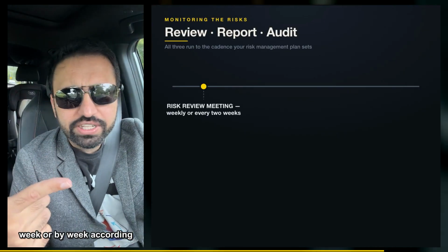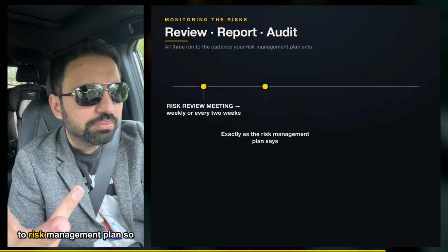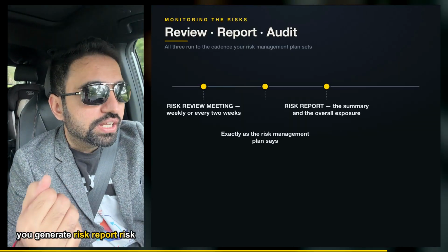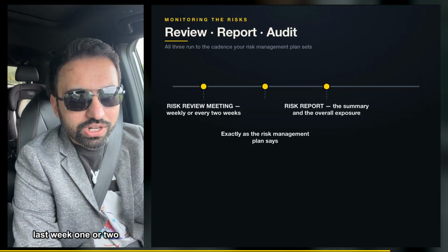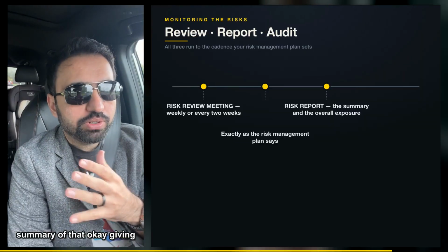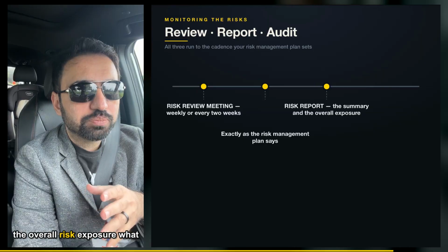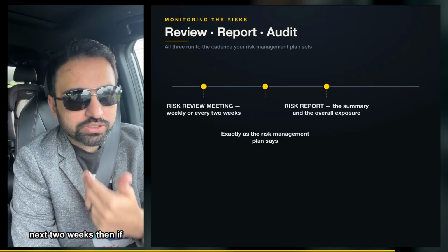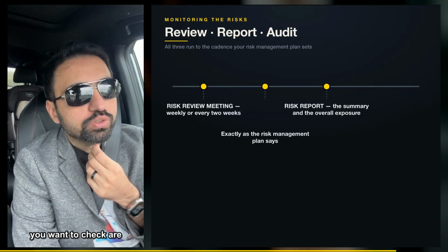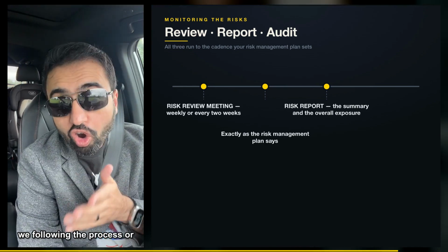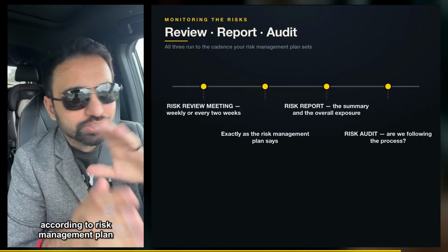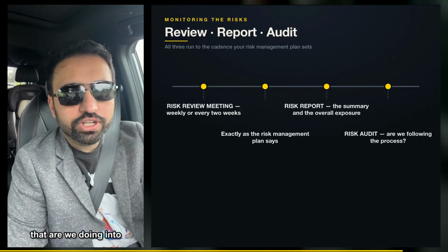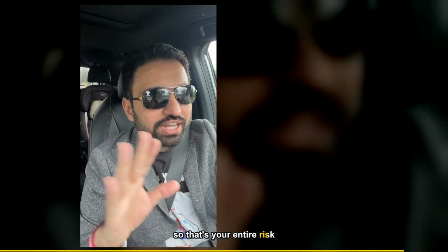Issue is any problem. So you do a risk review meeting every week or bi-week according to the risk management plan. You generate a risk report. A risk report is basically a summary of what has happened in the last week or two, giving the overall risk exposure, what risk can be expected in the next two weeks. Then if you want to check whether we are following the process or not, we do a risk audit. A risk audit checks against the risk management plan whether we are following it or not. So that's your entire risk process.